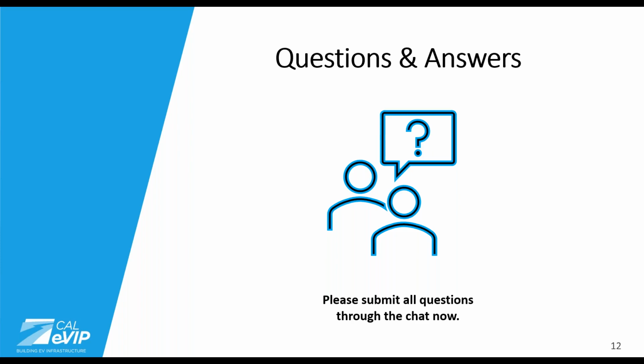So when do the CPT tasks and milestones have to be submitted by? So the tasks and milestones were requiring that within 14 days of its due date, that you either click it done or put a comment on there letting us know the expected date of completion.